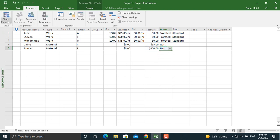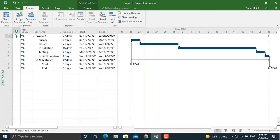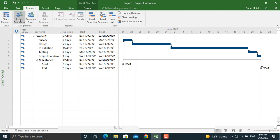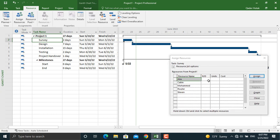Now we will go back to the Gantt Chart and assign the resources we defined. Go to Resource and then Assign Resources. For the Survey activity, for example, we will select Alex and click Assign. Alex will be automatically assigned and his wages for the day will be calculated by MS Project.